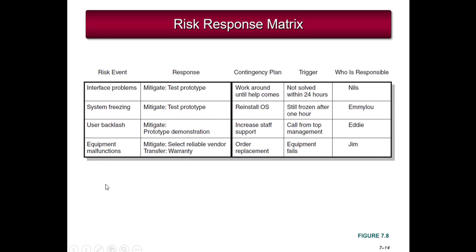So again, this is a copy of a risk response matrix. It shows a risk event, the response to the risk, the contingency plan, the trigger that lets you know to implement your contingency plan, and who is responsible.